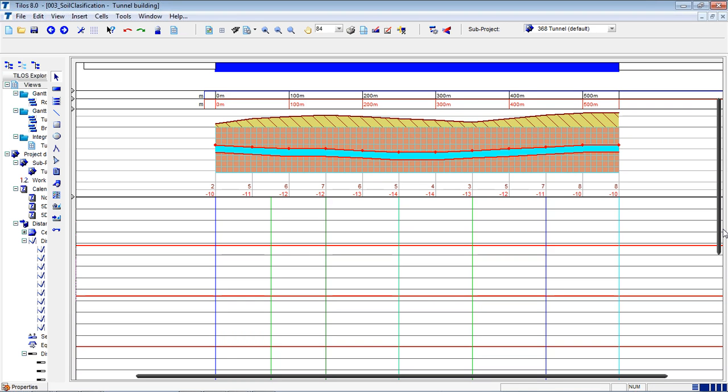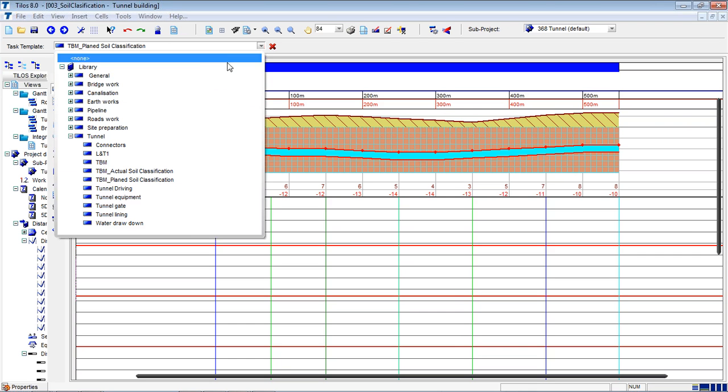And I can say that depends. What I will do is say, okay, he said 10 to 30. Let's make it 15 meters per day, or 20 meters per day. This way I will at least give some plan, because this is a requirement. What I'm doing now is inserting the task called the TBM,